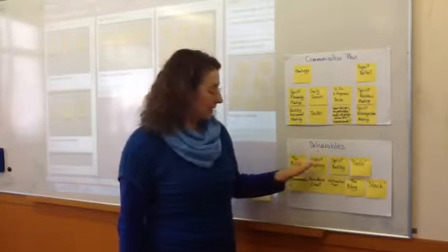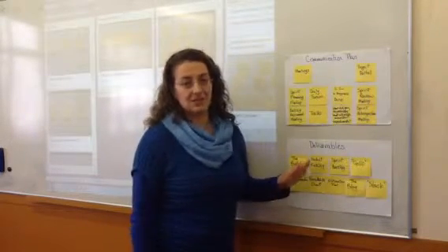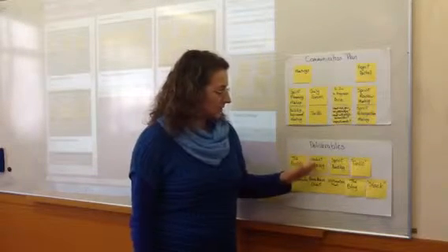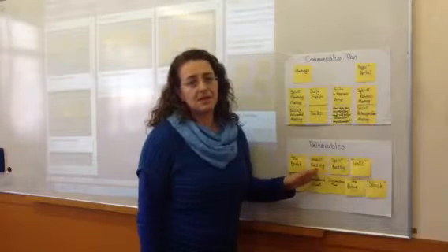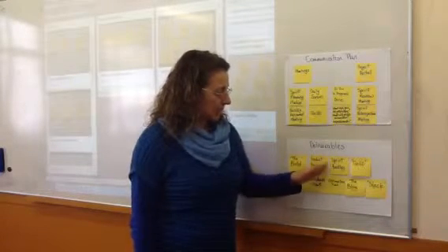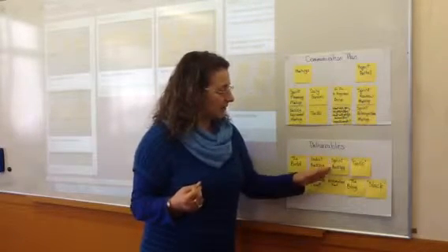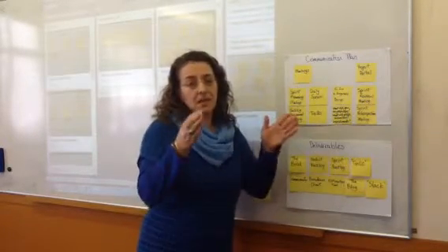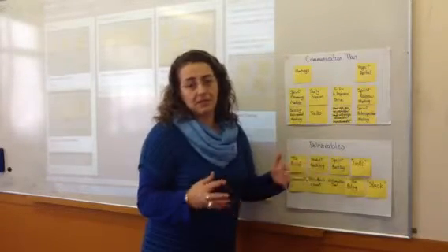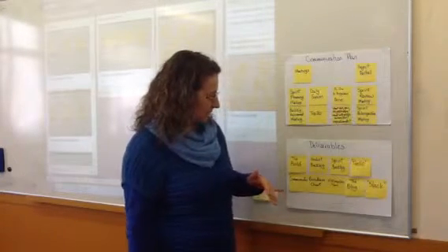For the project, we need to have a build, as I said earlier, a 3D virtual world. To achieve that, we need to list the items that are required in the form of a product backlog. Then we need to narrow it down even further and create a sprint backlog, so that whatever is inside that sprint backlog is created and developed in that sprint, in that duration.